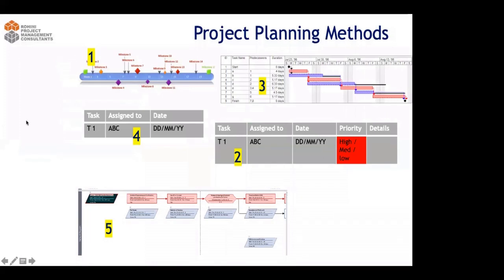This is just nothing but a number line, right? You have week 1 you will do this, week 2 you will do this. But for example, let's say desilting the lake. The desilting is going to be done in the next 1 month, so that's a milestone. Then you start the bund construction. Completion of the bund is again one more milestone. That way you have to have your preset milestones, and that would be reviewed.